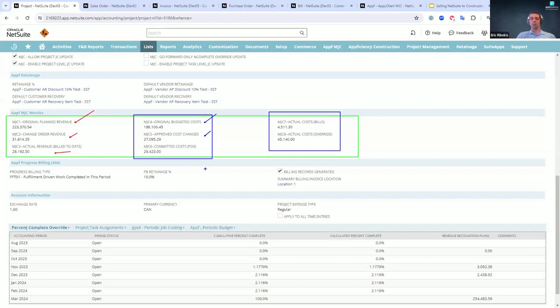And then oftentimes what you'll see throughout the construction process is they're ordering materials, they're working with subcontractors, they're leasing out equipment. Ultimately, what we bucket this as is called our committed costs, right? So you've committed to purchase these specific services or materials or equipment to ultimately fulfill and build whatever it is that you're building. And then also what you'll see here is tracking your actual costs to date, right?